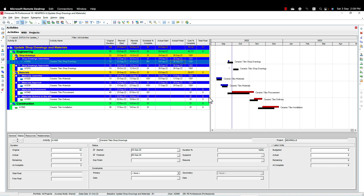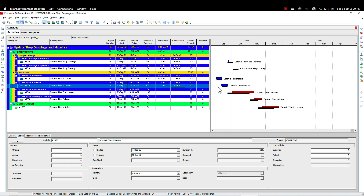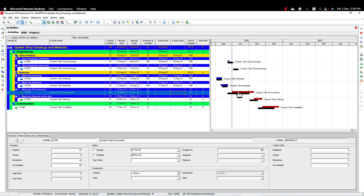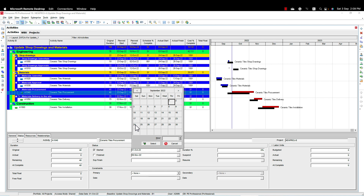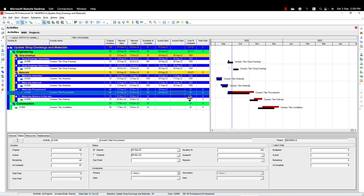Coming back to the second part of the question: the material is approved and I started the procurement — this information you need to get from your procurement department. I started it on 24th September. The question is how do I put the percentage here? Actually I don't put the percentage directly. Instead I ask my procurement department when they expect the manufacturer to complete, and I put the forecast finish date — the percentage will then be calculated automatically. For example, the procurement department said they expect manufacturing to be completed by end of October.